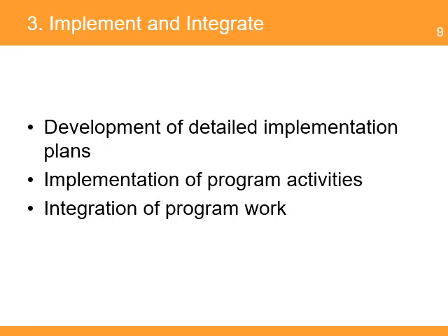In this sub-phase, the program team develops a program plan, which is the compilation of the different project plans developed by each project team. The program plans will help implement and monitor the program components, including program work not included in the scope of each project. The program components are integrated to facilitate the management and delivery of program benefits.